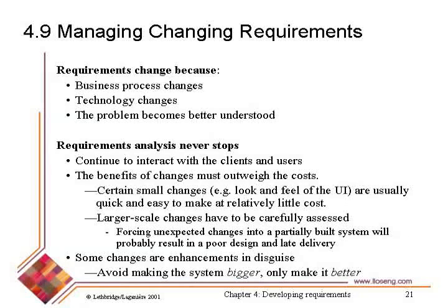The thing is that you want to minimize the number of changes. You want to get the requirements right as much as possible, but at the same time, as you're doing your design, you want to allow for changes to requirements where possible. If a requirement can be changed relatively easily, and if the cost of making that change is less than the benefit, then you're probably going to make the change. But you're not just going to have the developer say, oh, by the way, thanks, talking to a user, the user wants something, oh, I'll make a change.